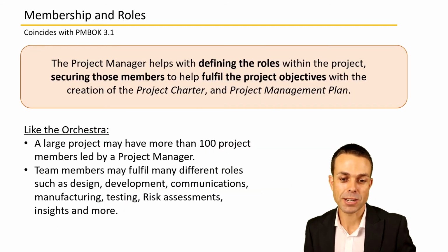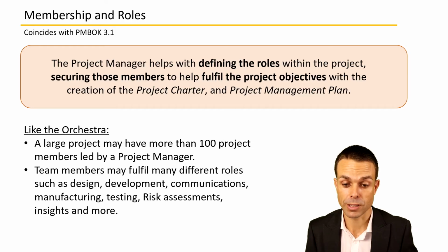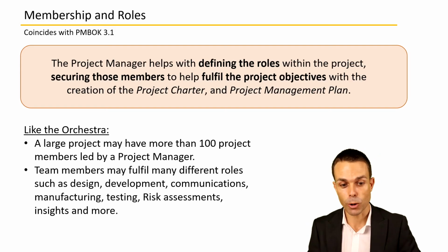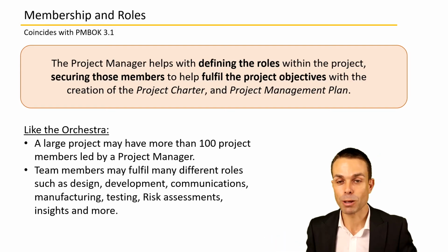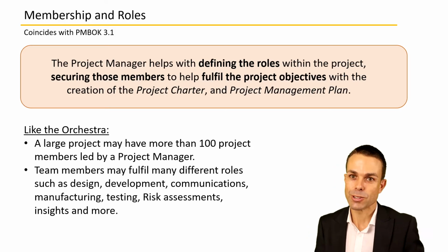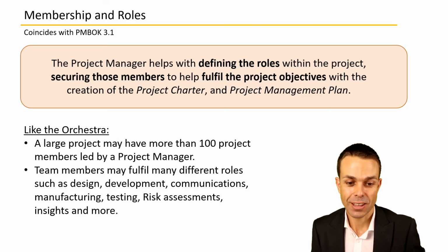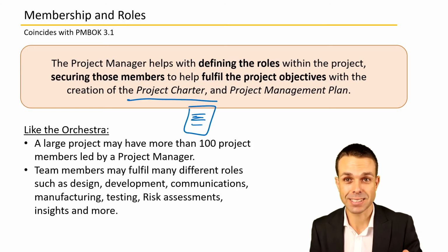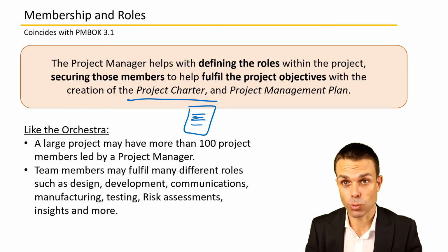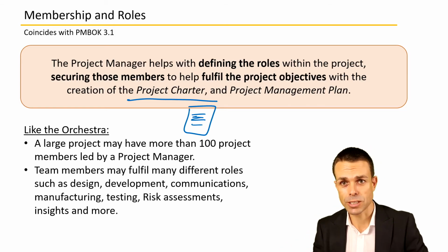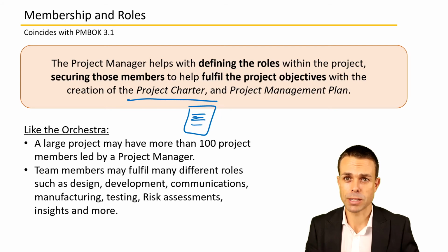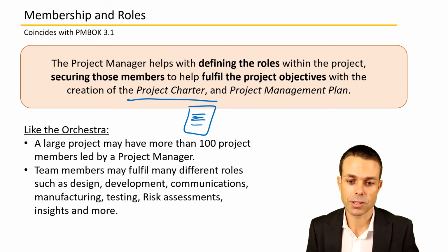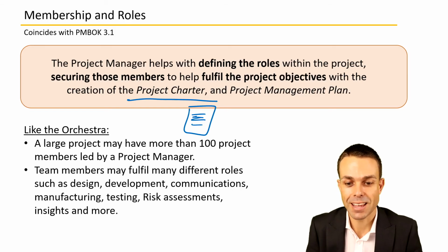So in other words, the project manager helps define those roles, for example, those team lead roles, the roles that you know you will need to deliver that value within the project, securing those team members, helping fulfill those project objectives. And we do that initially through the project charter, which is a little document. It basically has the business case, the initial idea, the reason why we're starting the project, the initial stakeholders, initial risks, and maybe even a small amount of scope and a small flight plan idea, just very basic to kick off and initiate that project.